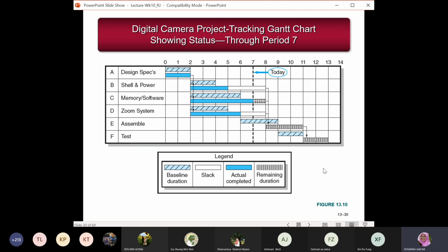now because in this COVID situation, many projects are actually behind schedule because of movement control order. So these are examples of why you can extend the project. Sometimes it's unavoidable, although you plan to complete within certain number of months, but because of actual implementation, there are uncontrolled elements, uncontrolled factors, which cause the project cannot complete on time.